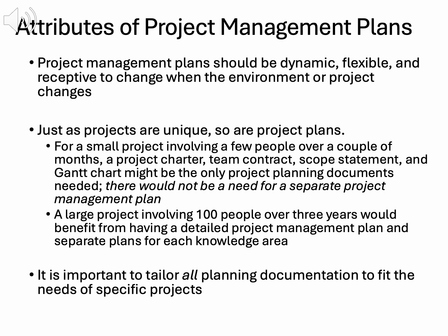Project management plans must be dynamic, flexible, and receptive to change. Projects evolve. New requirements, risks, or constraints may arise. The plan should accommodate these shifts while maintaining its role as a baseline. For example, in the just-in-time training project, if a new training course is added, the plan is updated to reflect changes in scope or budget, keeping it relevant.